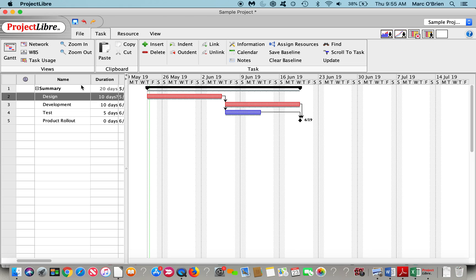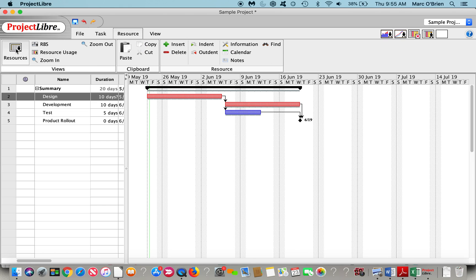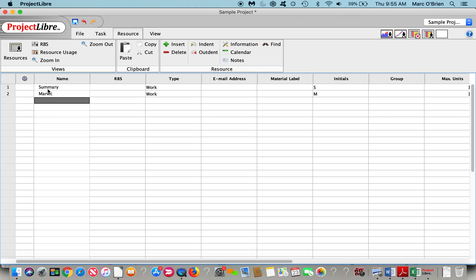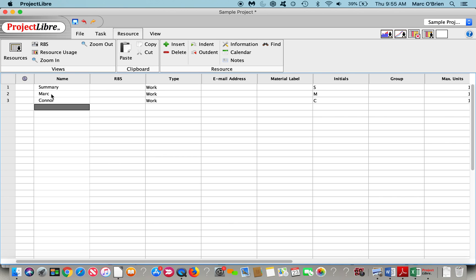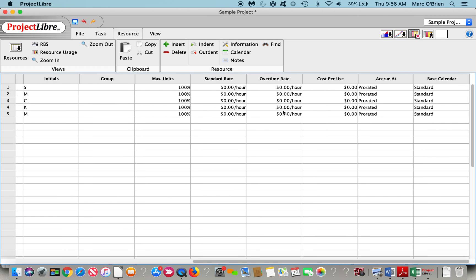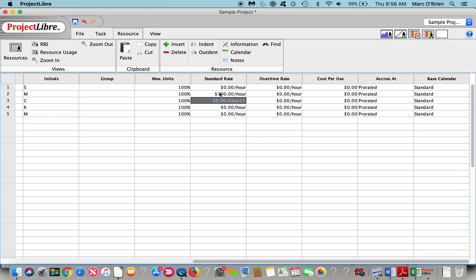If I click over on resources, we can go over to the resource pool. I can say summary, and I can add Mark, Connor, Kylie, I'll put Mindy in there as well. They can be work types or material resources, we can put the emails in there. We can also put hourly rates in here. So I could say $100 an hour.